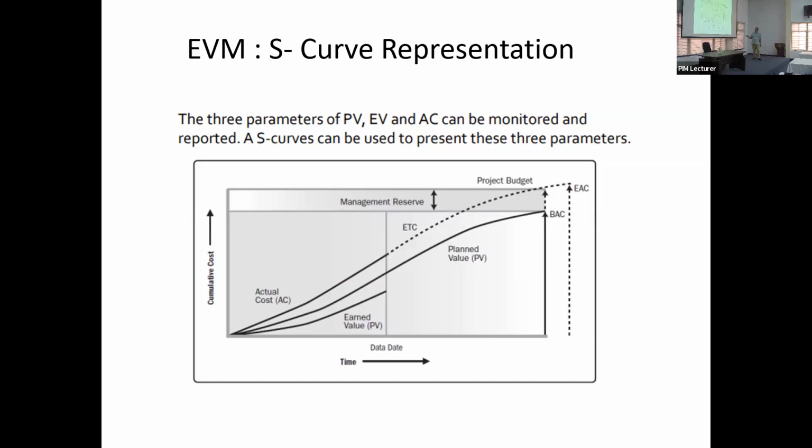So, what does it predict? It predicts this project at this stage is here, understood. Now, it will predict this project is going to finish here. Therefore, your budget is going to be so much in excess. You better find extra money here. It will also predict it is going to get extended, so you better get ready for the project delays.